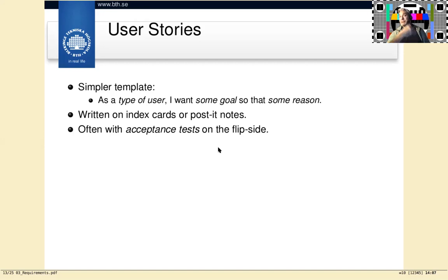And then as time progresses, and this epic, as they call them, these big requirements, big in the sense that there's a lot of things to implement in them, as time progresses and this epic becomes more and more important, it's suddenly the most important thing that we do. We don't have anything more pressing to do. Then we'll break that down. We'll open up this, we're entering the Chinese market, and see, what does that mean? Well, we need support for pictograms in our text. We need a different keyboard on our application. We need different images, whatever, and so on.